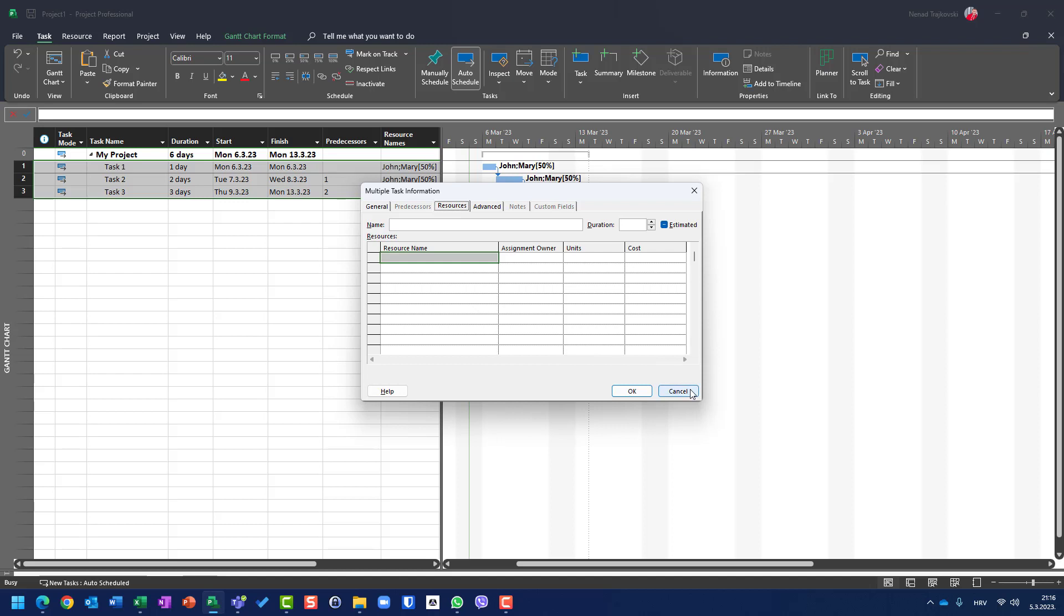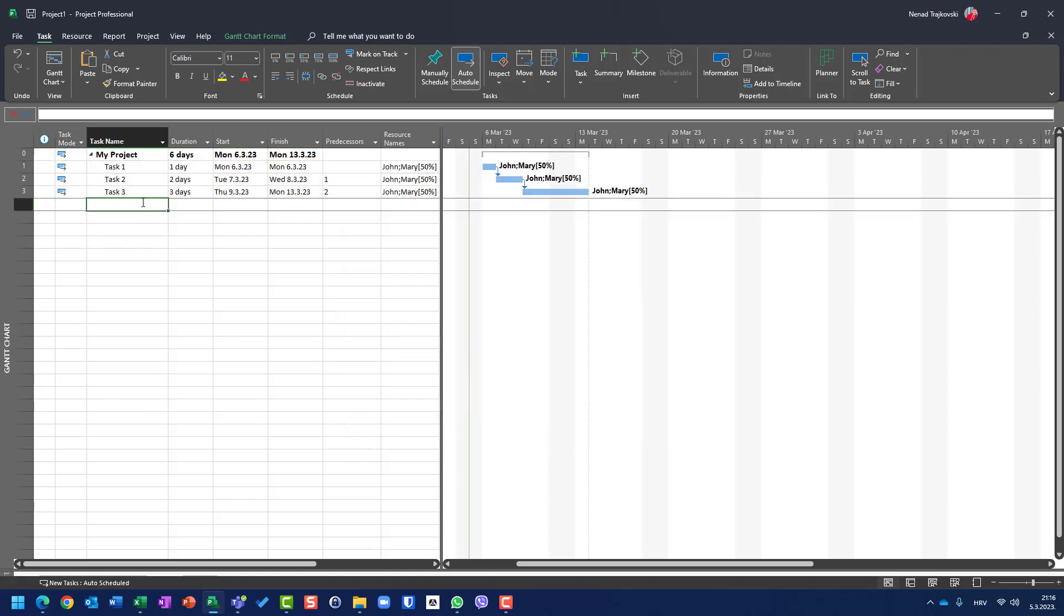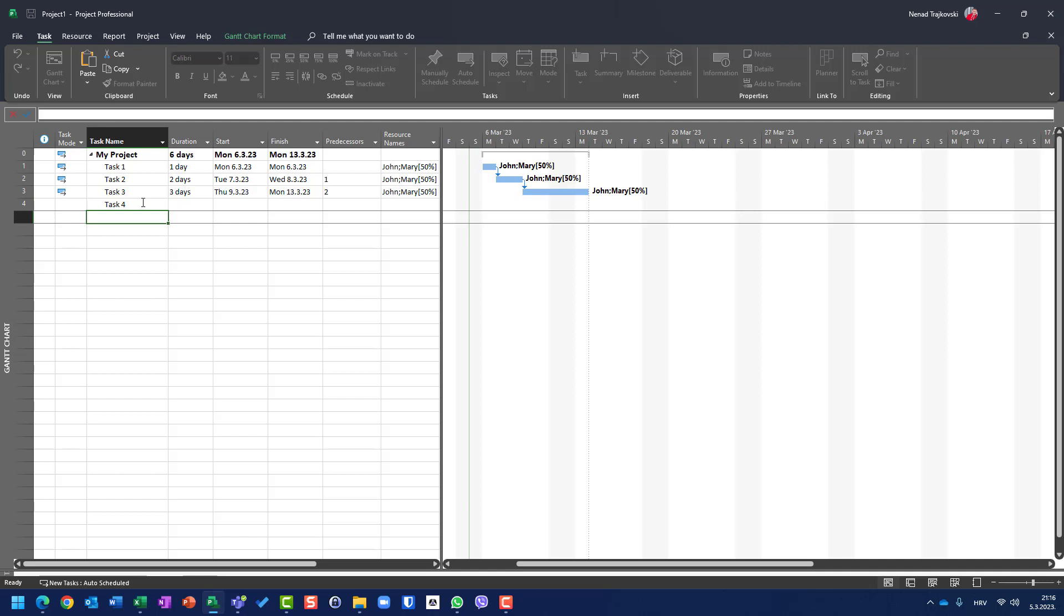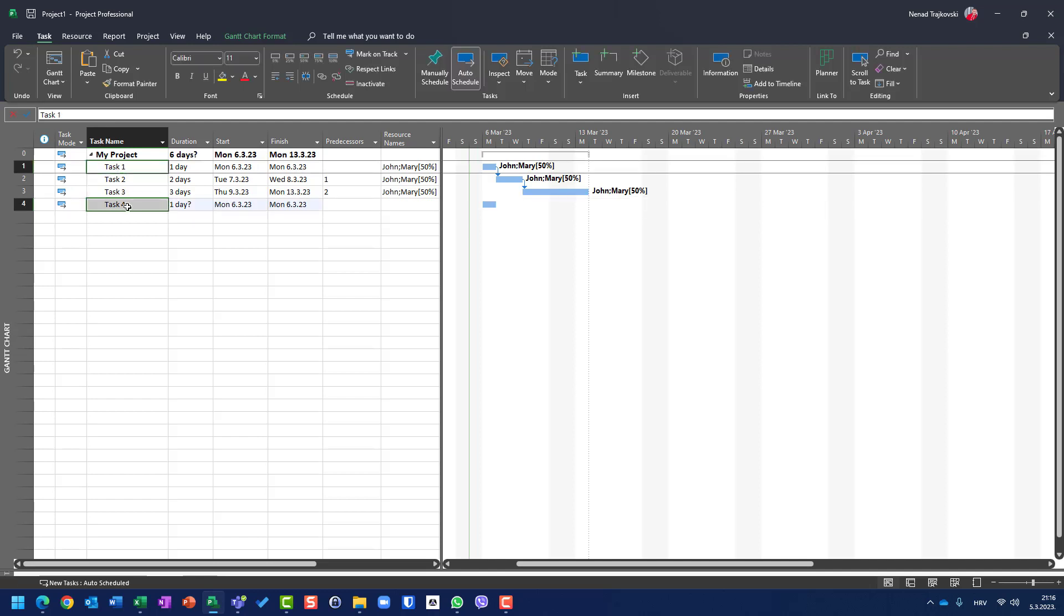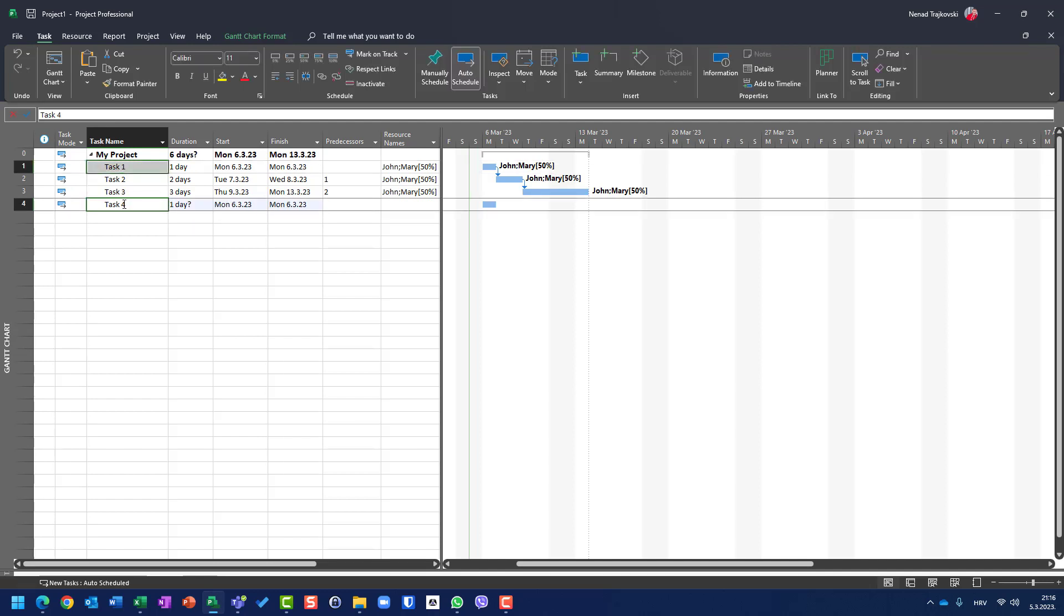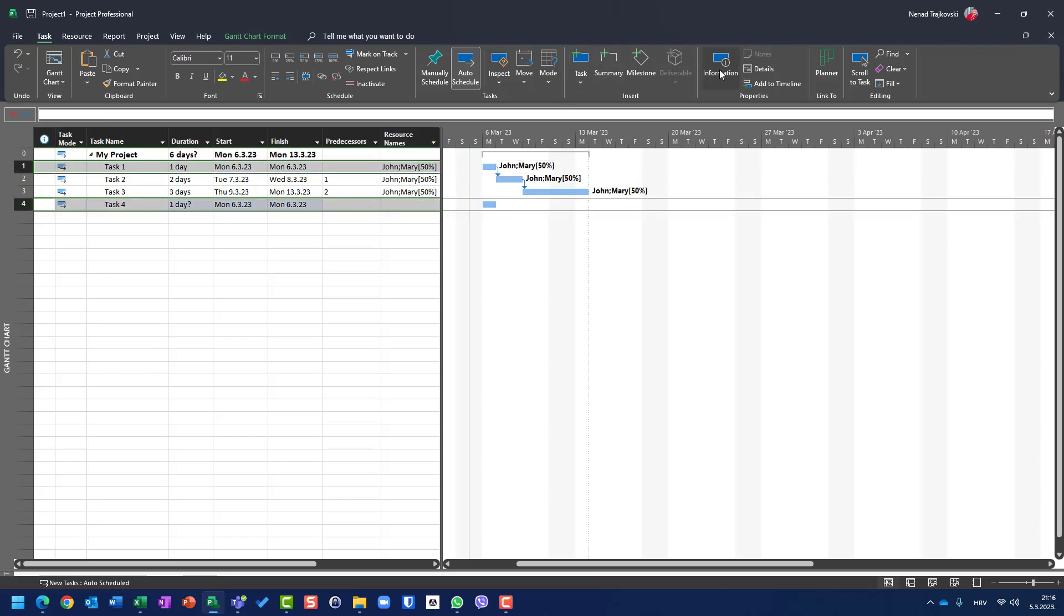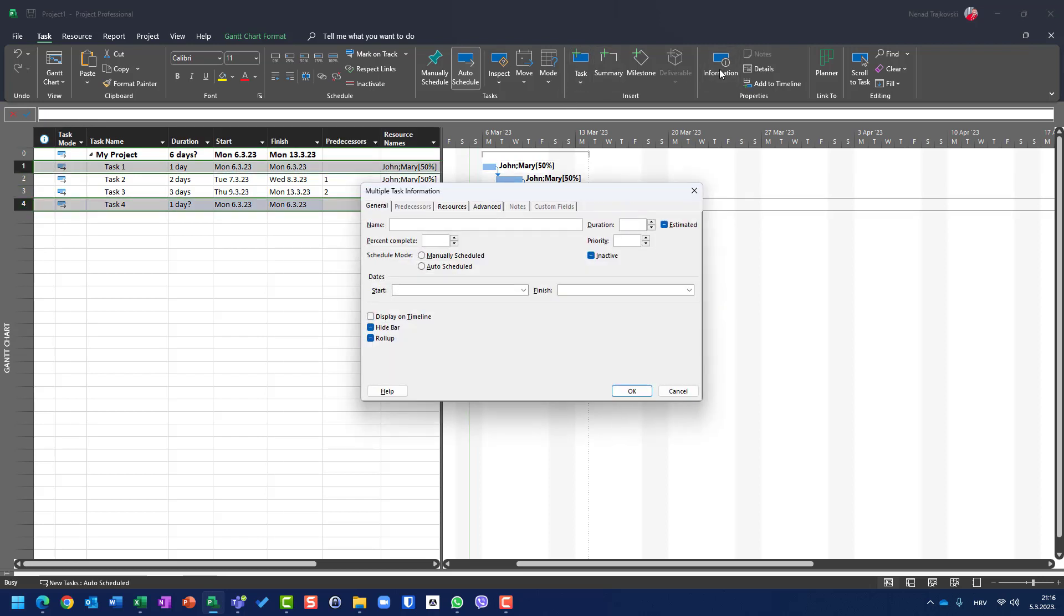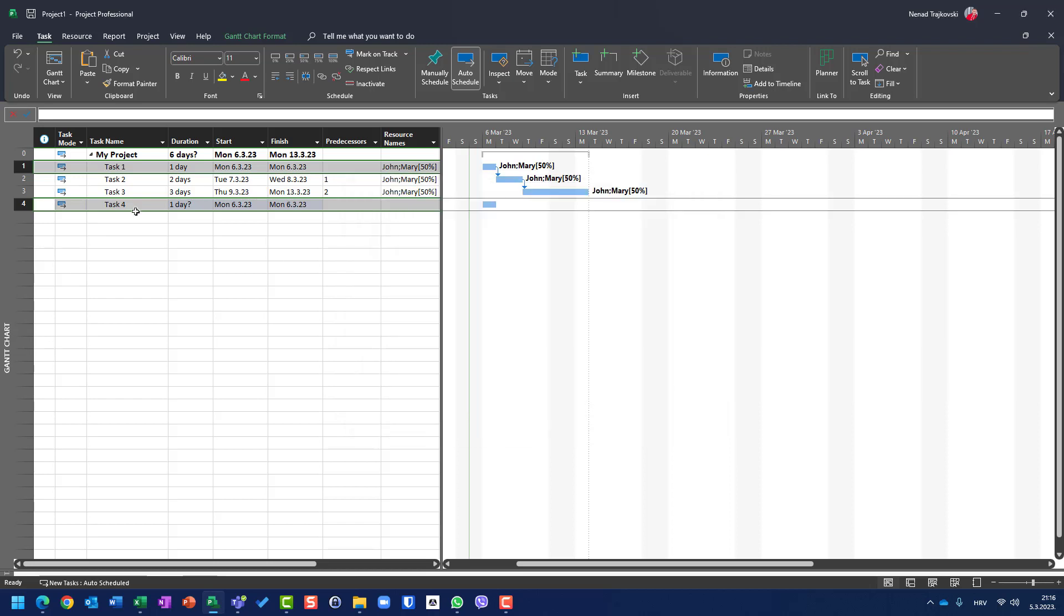OK. Because now I can have task four, for example. And if I choose task one and task four, here, OK. If I go to information tab and if I go to resources, I cannot see resources here because John and Mary are assigned to task one, but not to task four. So don't be surprised when you don't see your resources which are already assigned.